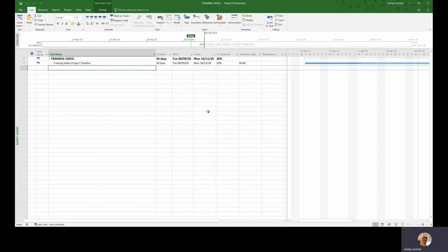Now that we've opened the project schedule, you can see that it has opened in Microsoft Project, which is external to the Project Online system. Your editing will therefore be in Microsoft Project, and after you have finished editing the schedule, you will need to publish the changes back into the cloud system. Publishing is slightly different to saving, but fortunately there is a quick and easy way to do this.